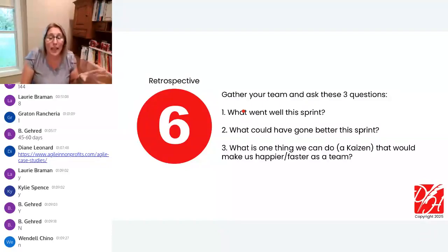It really helps to think about what your successes are because we want to replicate those. So if something went well, let's do that again. What can we do to make sure we get to do that again? We might talk about something that could have gone better, maybe a way we could have gotten feedback faster or different. But we probably also are going to ask ourselves if there is just one thing we could try to make us better, happier, faster as a team in this next week, or these next 2 weeks. What would it be?